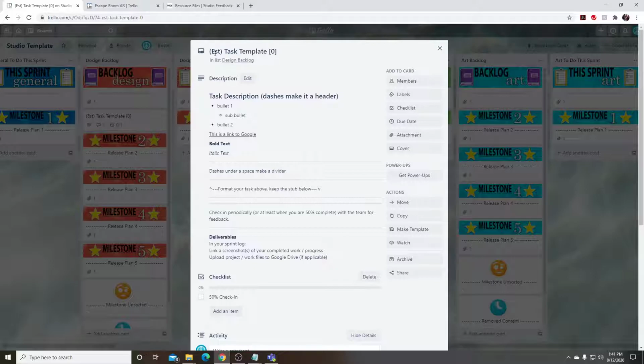Something that my team learned this semester, which is our 3rd semester in studio, is that the more time we set aside for sprint planning, the more accurate our burn down was. And rather than just having the leads throw out an estimate that we thought was appropriate, actually involving the team and creating their own estimates, particularly the people that would be working on those tasks, led to a better experience of sprint overall. Plus our burn down chart looked really nice, so that was fun. That's where the estimate goes.